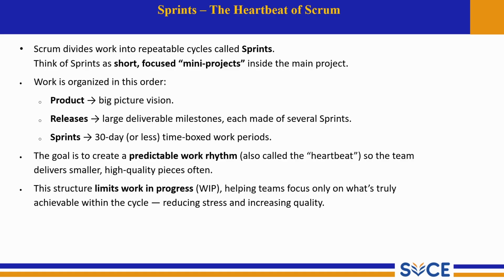The work is organized in this order. Number one, product, the big picture vision, and next is release, a large deliverable milestone, each made of several sprints. Sprints are 30-day time-boxed work periods.